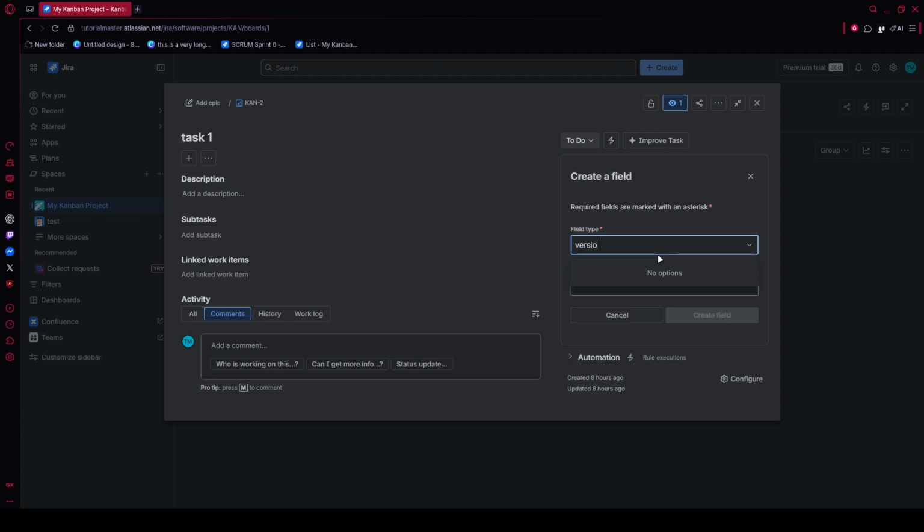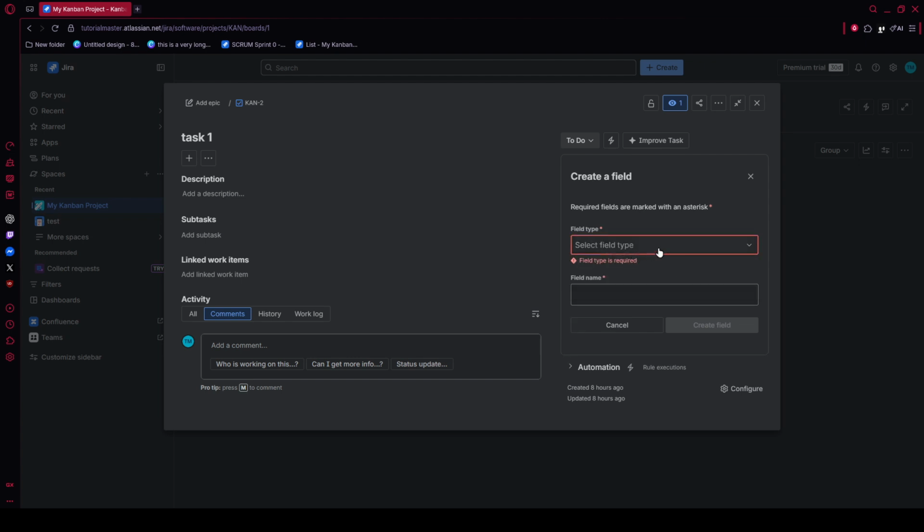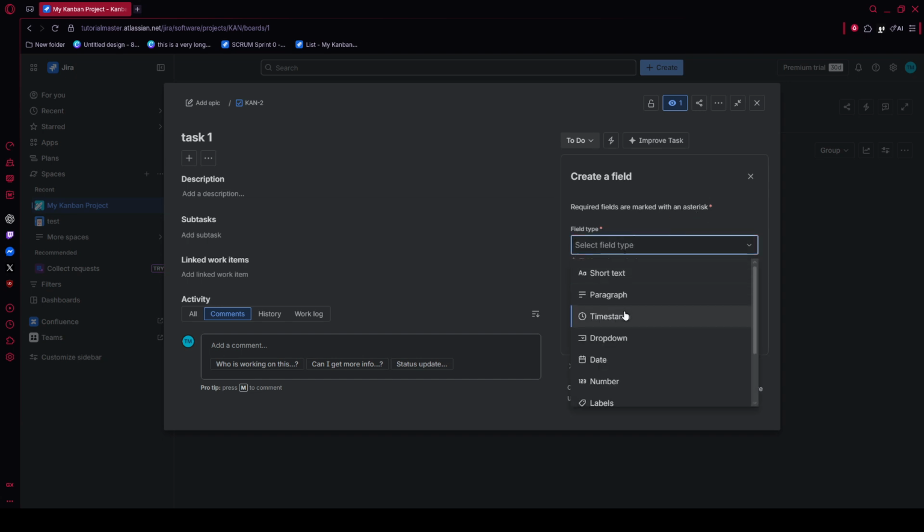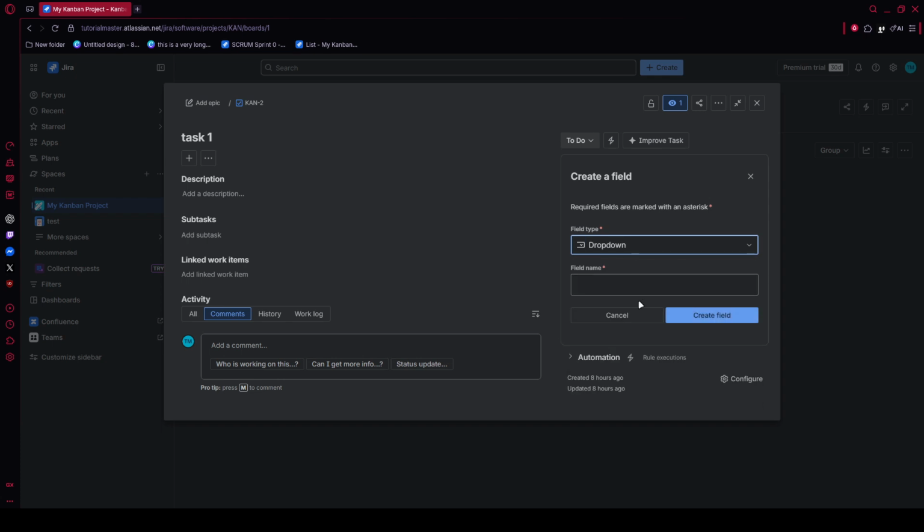After selecting the version, take a moment to confirm that it now appears in the Fix Versions field. In most Jira setups, your change saves automatically, so there's usually no separate save button to press. Once you see the version attached, the issue is now linked to that planned release. That's it. You've successfully added a Fix version in Jira, making your release tracking cleaner, more accurate, and much easier to manage.